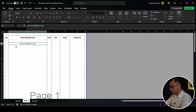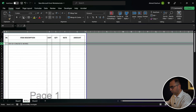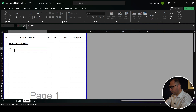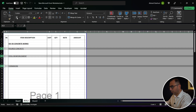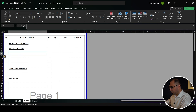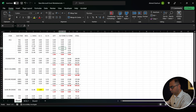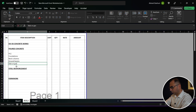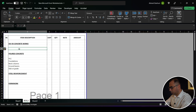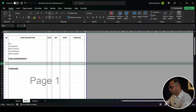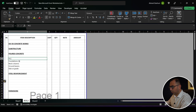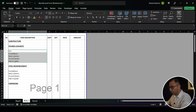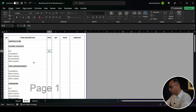Now I have a BOQ page. I'll label it Division 3: Concrete Works. For the concrete works I have poured concrete, steel reinforcement, and formwork — these are the three main subsections. I'll add some rows. Under poured concrete I have the PCC, then my items: foundations, neck columns, ground beams. I'll also add slab on grade and a subsection called Substructure. In the substructure I have poured concrete, steel reinforcement, and formwork. For the PCC items I don't have steel reinforcement.